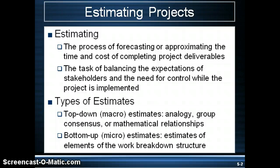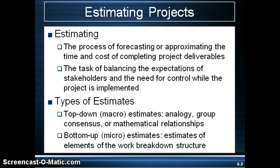There are two types of estimates. There's the top-down method, which is a macro-type estimate. This is typically done at the very beginning, often before the WBS is developed. It is mostly used to present the justification of the project, most often using past data on other projects or high-level estimates based on some preliminary data. The bottom-up estimate is a micro-type estimate, which really requires having the WBS completed and understanding what the work packages are.